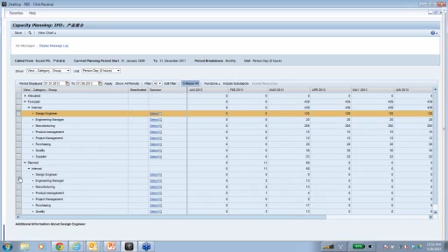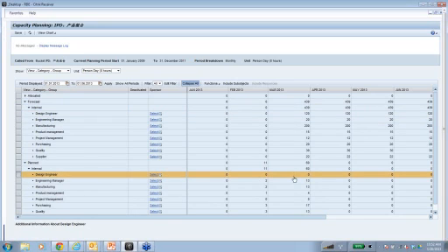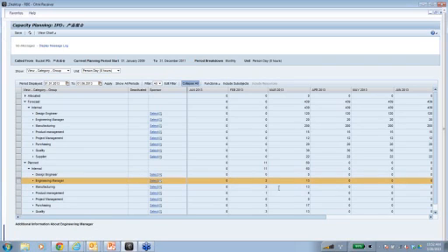So here we can see for designers, let's go down to one where I've got some information on. For the engineering manager, I got 13 man days for March versus the engineering manager needing 20. So we're a little bit understaffed there. So this is how that system is going to give you some actionable information you can use in there.